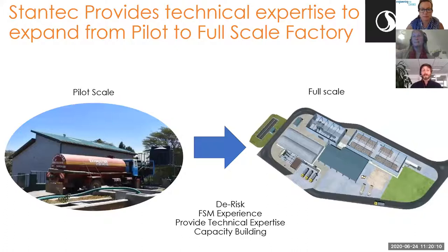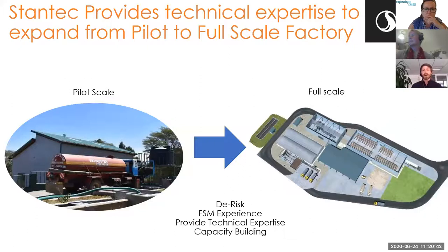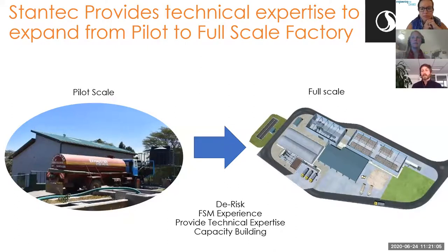Eric: Emily said it perfectly — the setup, planning, governance, and regulation is really the hard part. As Stantec, our goal was to bring their pilot scale into a full-scale facility. What that means most to me is de-risking the project — identifying risks to success and then either engineering around them, or if the risk will always be there, developing backup plans, mitigations, and redundancies. What we bring to the table is fecal sludge management experience, technical expertise in process engineering, and the ability to build capacity within organizations like Sanivation and the engineering community in Kenya.